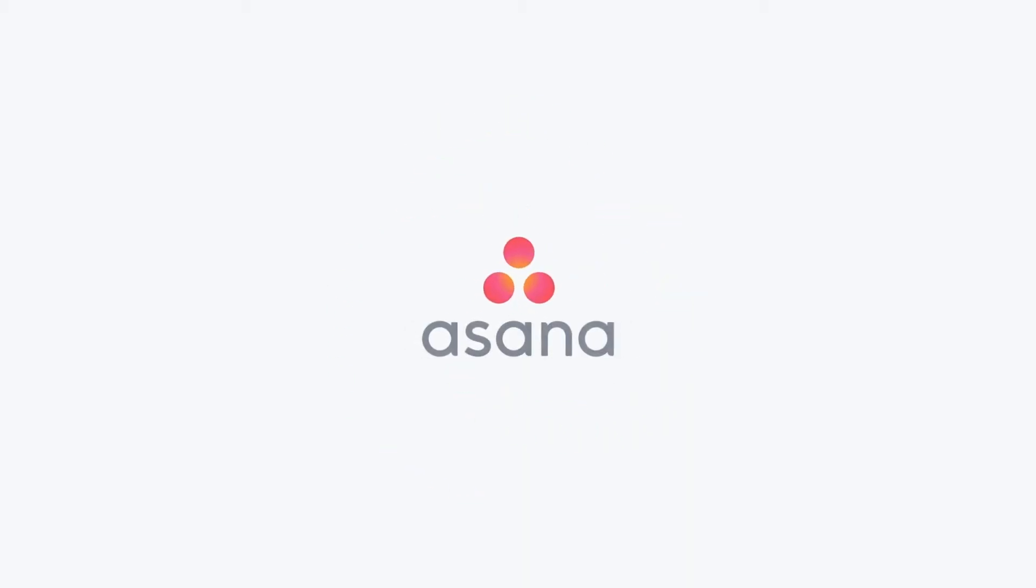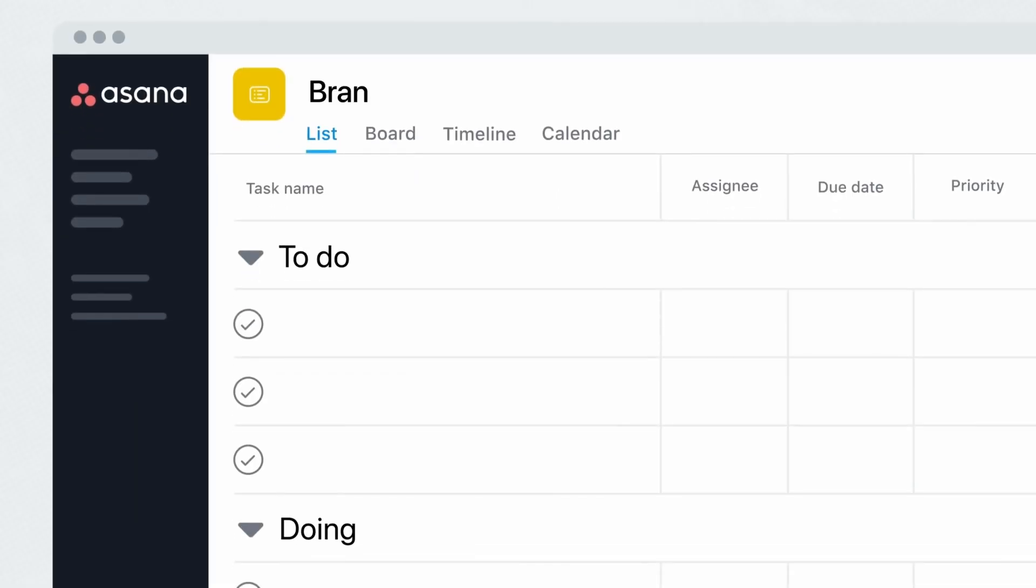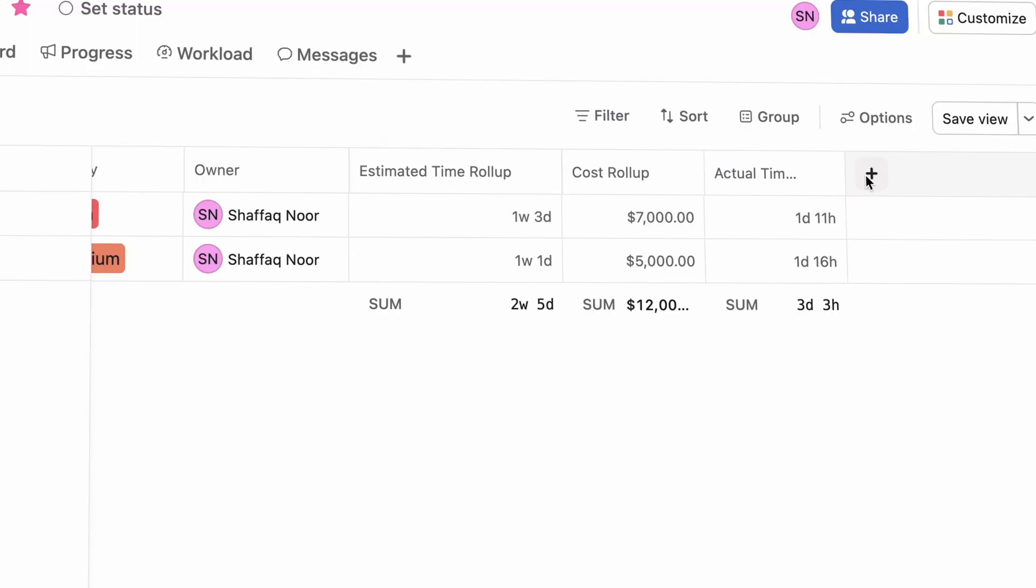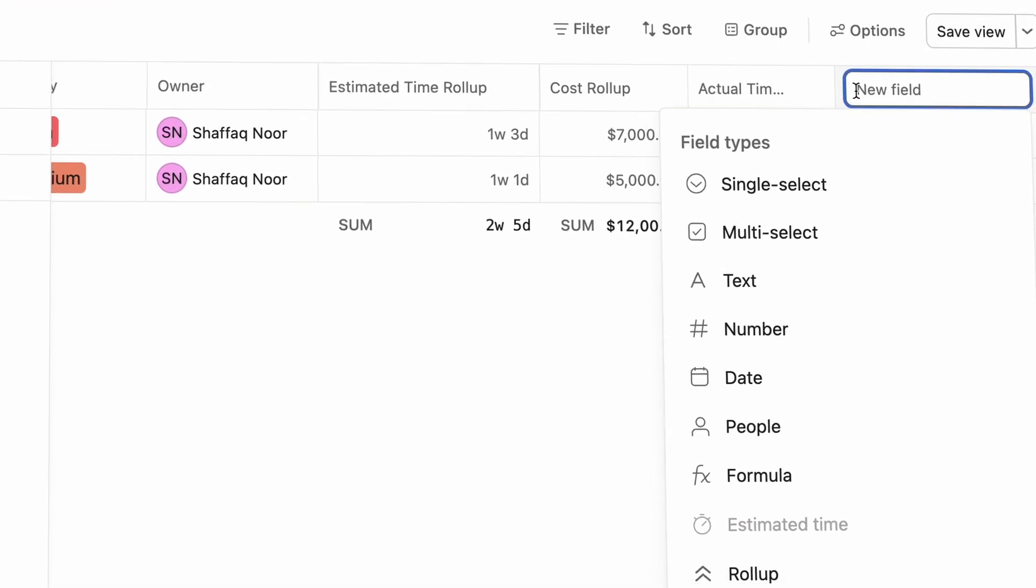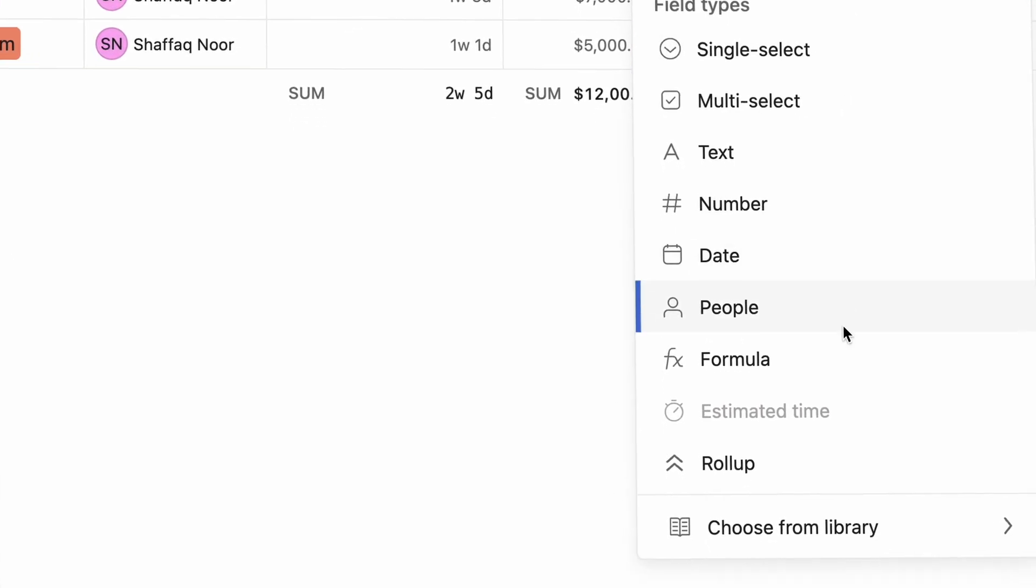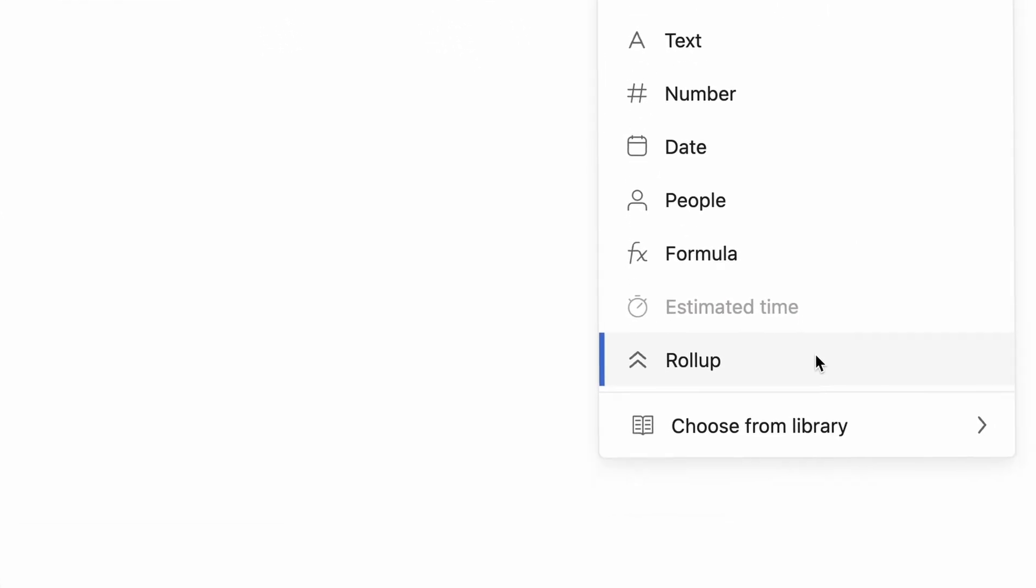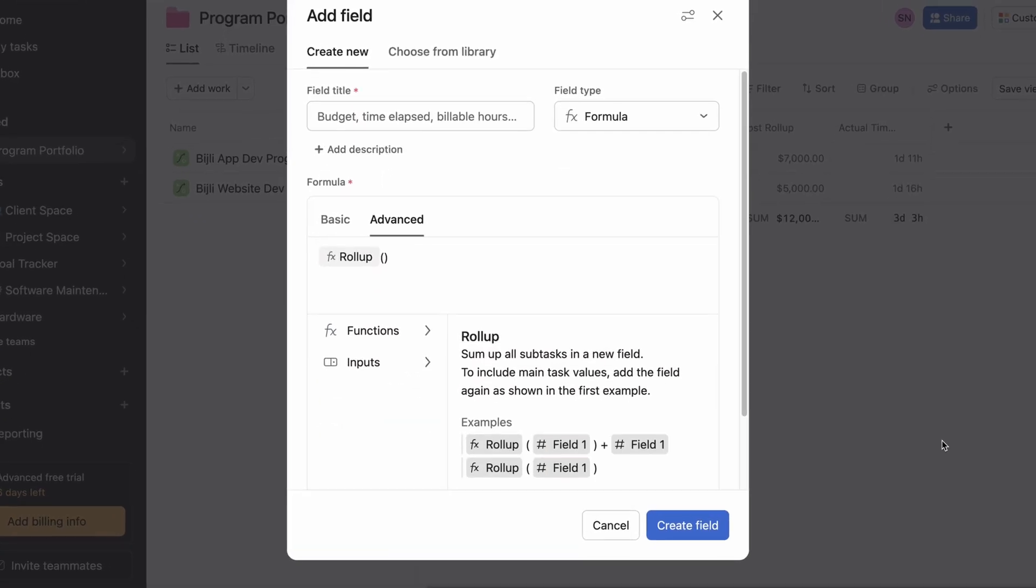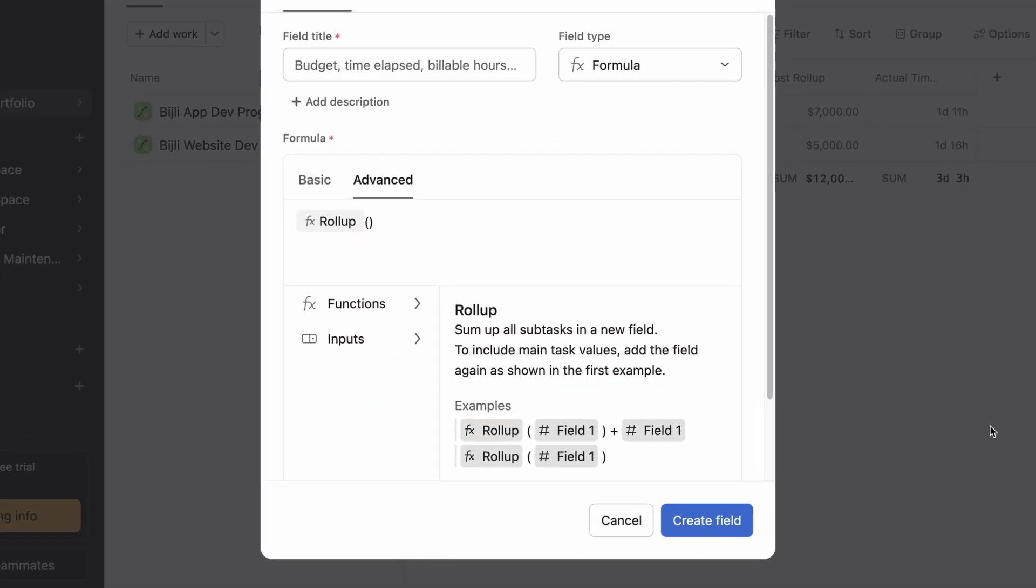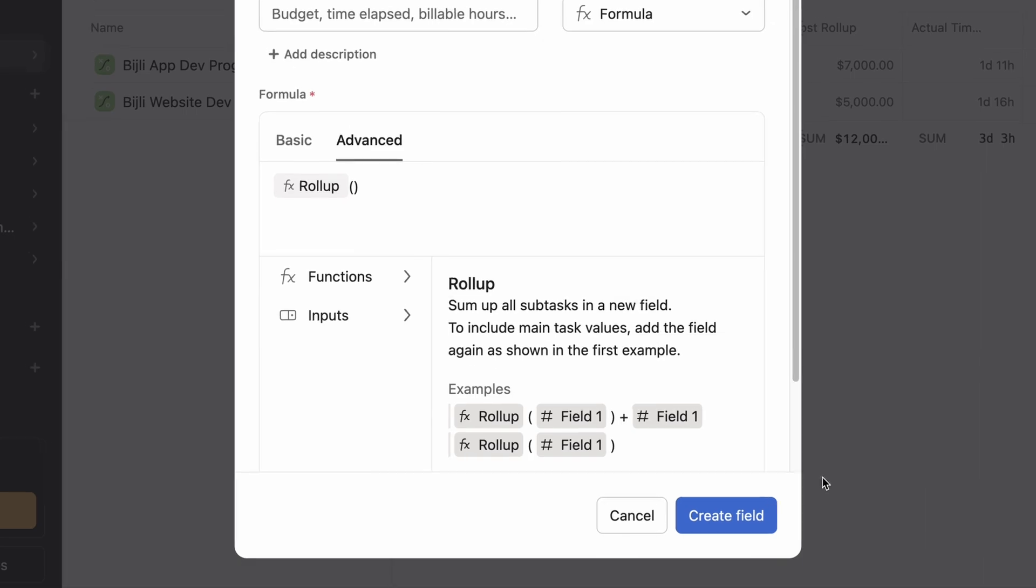If you use Asana for project management or program management, a field that would be very valuable to you is a roll-up field because it allows you to roll up all of your project's number fields and aggregate them into one.